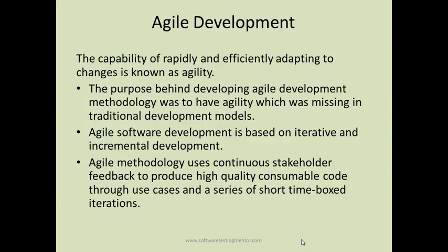Once everything is in the product backlog, these sprints start, and those requirements or user stories are pulled from the product backlog to the sprint backlog. And then in the sprint, there are scrum teams which take all those requirements, organized based on different modules.